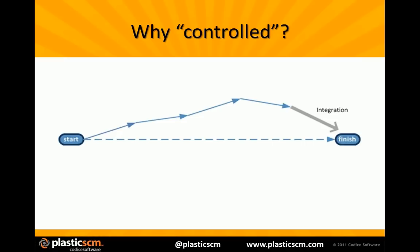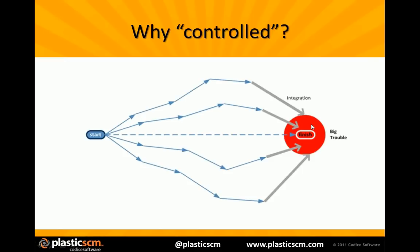Let's think about how the integration process goes on a software project. You have a starting point, a finish point, and then the software evolves and is integrated at the end — that's a very simplistic picture. But what actually happens is different. If you delay the integration, you'll have a big trouble. This is normally known as big bang integration, and it was the root of all the problems in many projects around the world.